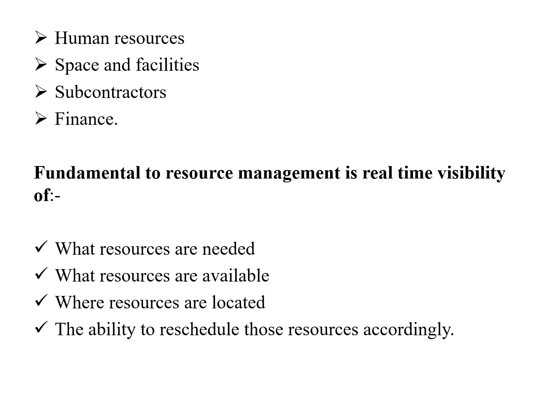Why? Because the transportation cost also will add to this. See, project management is not at all easy. Why? Because each and every piece of information the project manager should know, then only he can plan. If we calculate some cost with the material, it will not help if he does not know where exactly the material is. It's very problematic, because the transportation cost also you should add to the budget. The ability to reschedule those resources accordingly: if you're not getting that resource, you should reschedule.